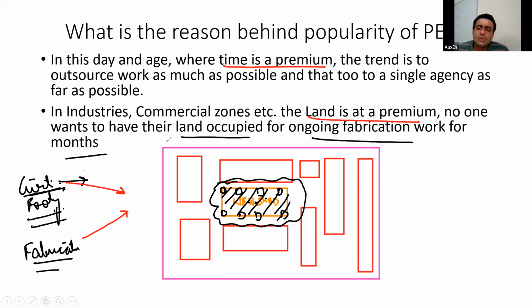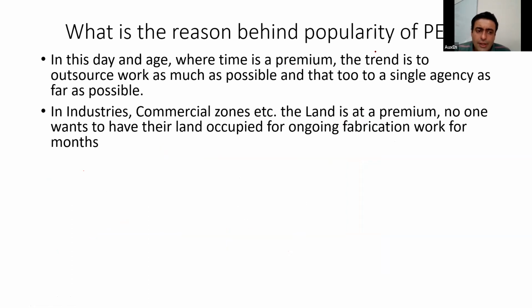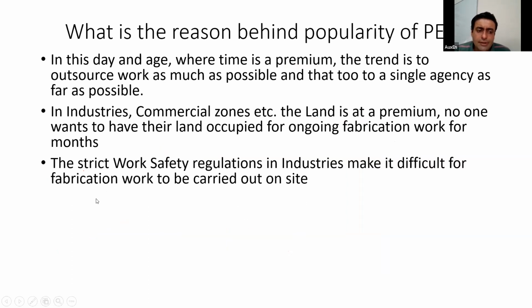Because you can do the parallel activities in this way, the pre-engineered building becomes more preferable, because parallel activities can be planned. Okay, so this was the next point.